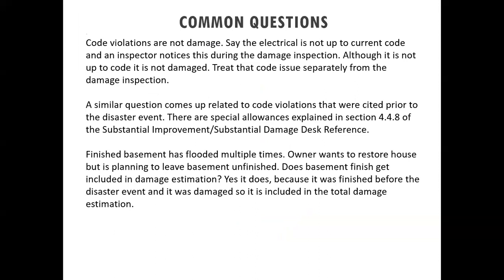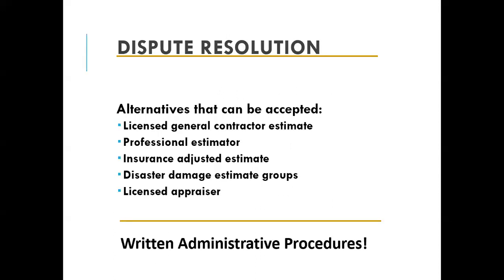Code violations are not damaged, so those are excluded. If there's special allowances explained in the desk reference, a finished basement would be part of the estimation for sure. So it's just kind of going over that since we have quite a few basements in Kansas.